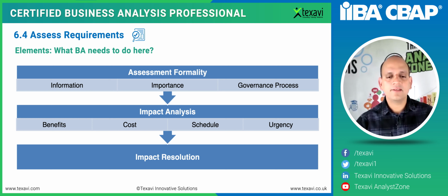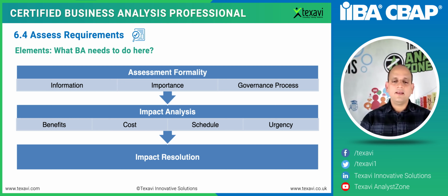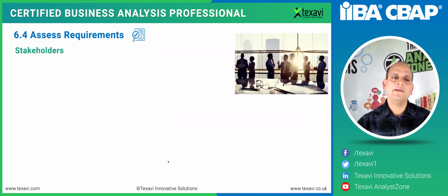And then impact analysis, we do again, like in the previous activity, assess the potential impact of this particular change or requirement on the benefits, cost, schedule, urgency, time and the resources. And then you would take a decision. What is the final resolution? Is it a go or a no-go decision? Should we go for it or not? Should we accept the change or reject it?